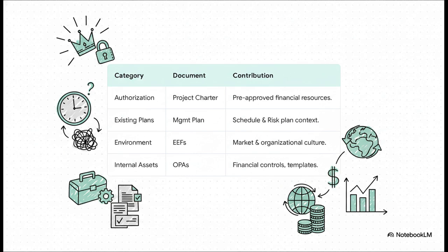Now this is the gold mine. This is your company's past experience, policies, templates, and most importantly, data from old projects. Any top consultant will tell you this is where you learn from past mistakes. This is where you find out if the last 3 projects like this one all went 30% over on materials. That's something you really need to know right now.